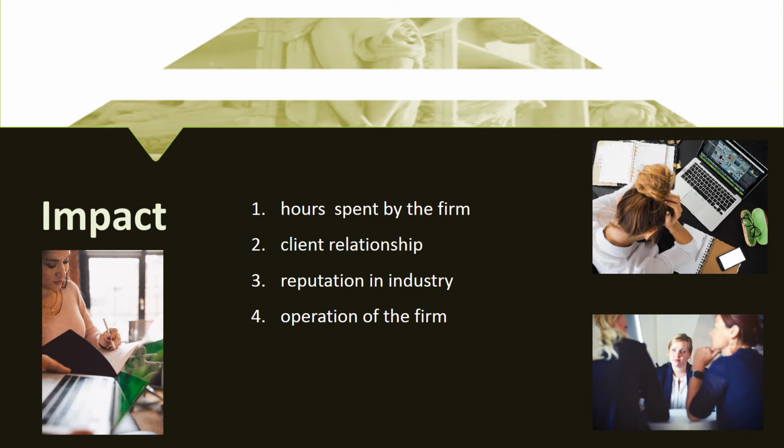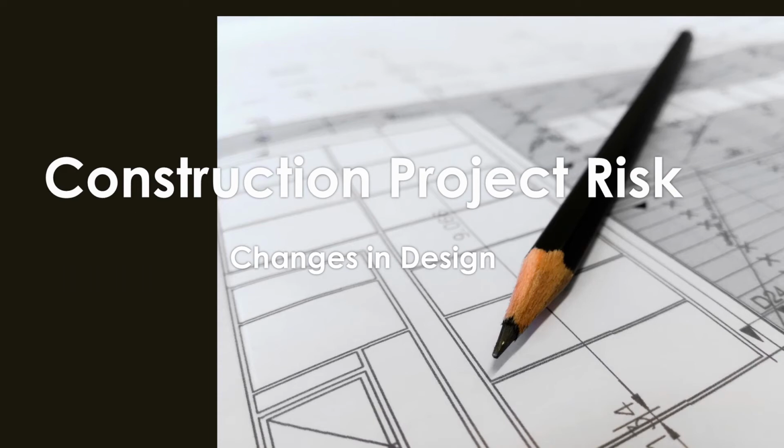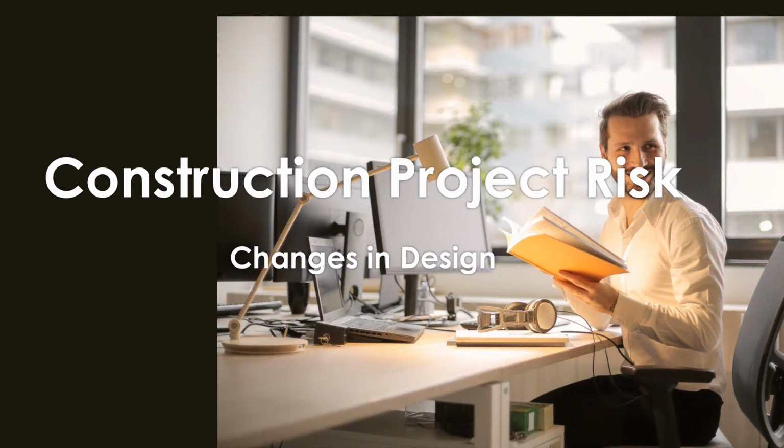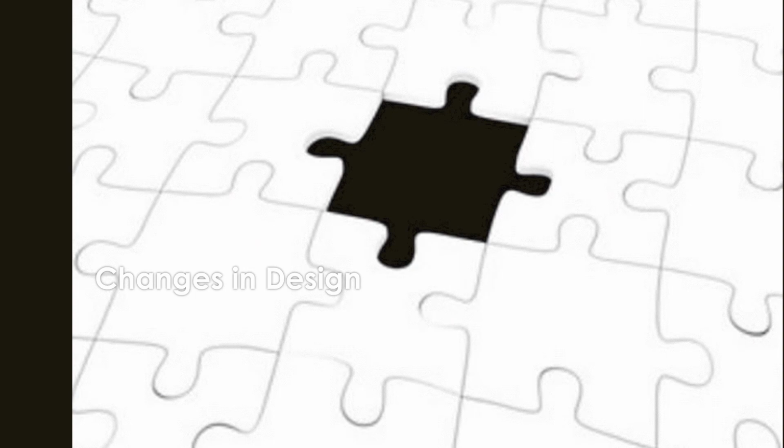Let's look at another common issue: design changes. Changes in design are often assumed to be a positive event for construction firms in terms of profitability and project success. This may or may not be the case. Design changes may also be a source of extra revenue for the architectural firm. However, caution is advised. Design changes may stem from an incomplete design at the initial stages of the project. This is often the result of a lack of investment up front or incomplete decision-making by the client.